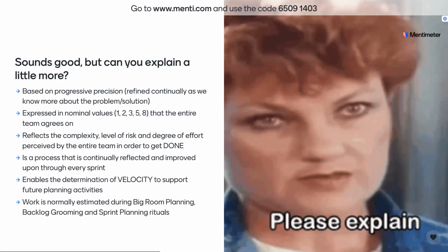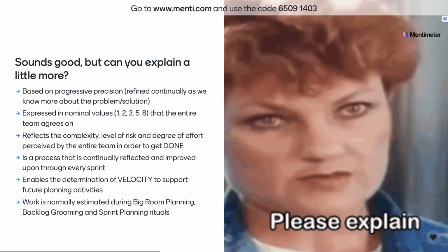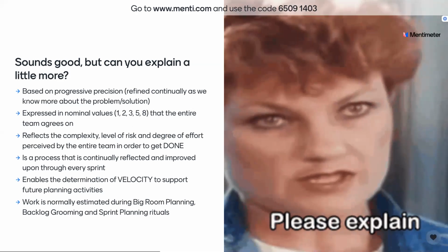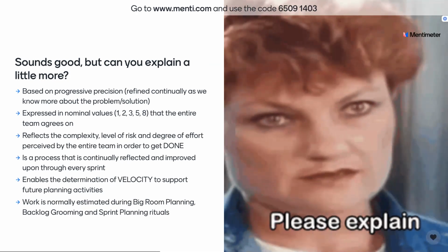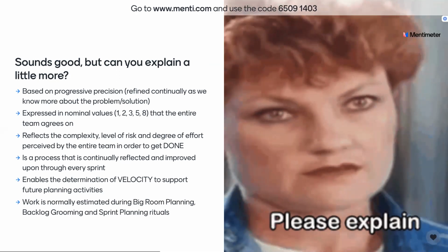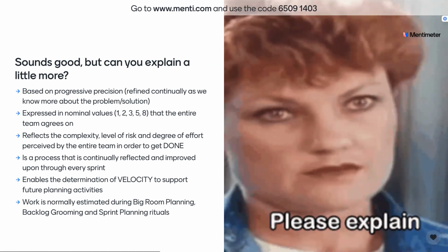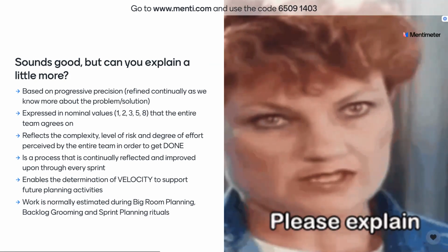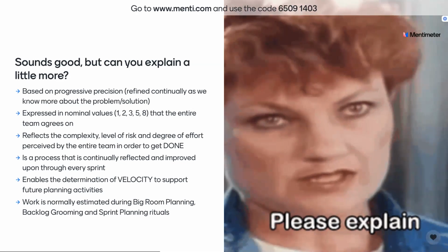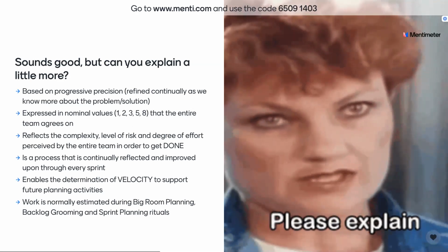And it's simply saying here that when we're measuring the complexity, the risk, the effort of our work, we'll assign it a value that we think is reasonable, because I'll explain shortly how we apply that thinking to our sprints. It's something that the whole team agrees on. So there's a couple of things that we've got to do in order to accomplish that. However, by doing this together, you're eliminating somewhat the subjectivity and you're relying more on comparing it against something else. It's very easy to say whether this apple is twice as big as this one, or three times bigger than this one, even if it's a broad understanding that the team has. It means that you can move forward and get to doing quicker and learning from that experience, tailoring your estimation ability as time goes on.